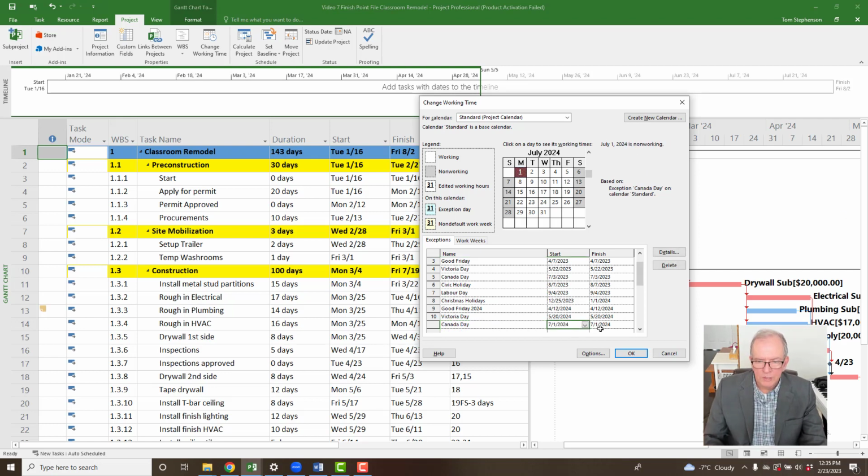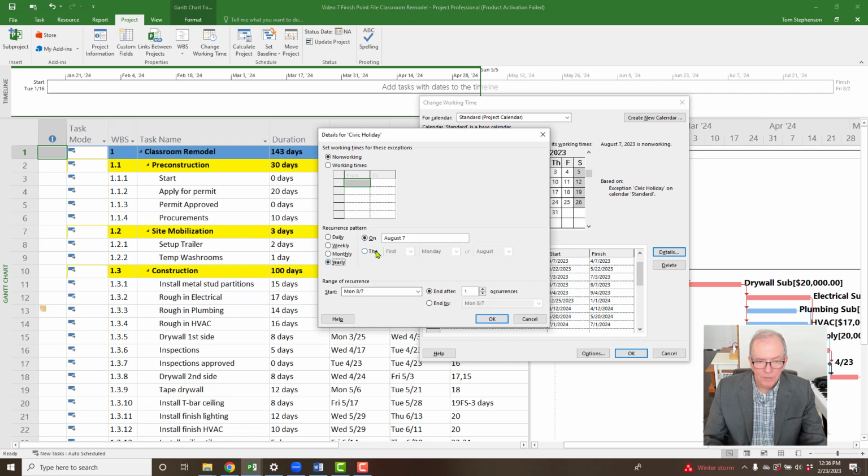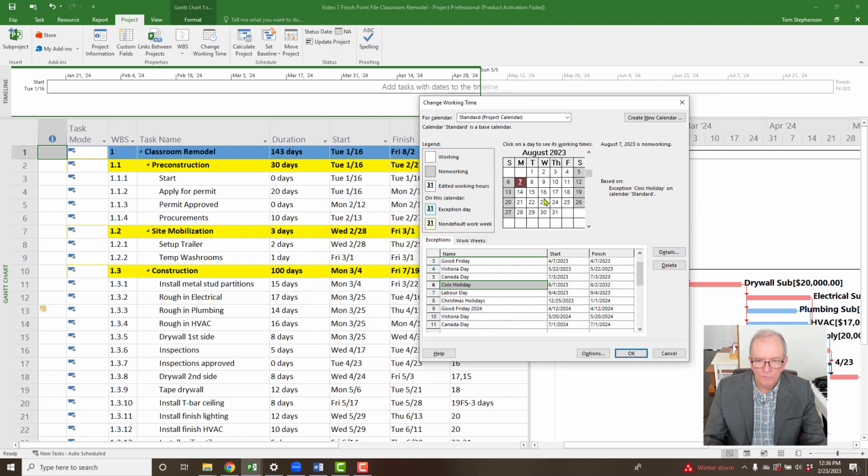Again, as long as you get the gist of how to put in these holidays, we did that in a previous video. I just wanted to update a few things here just so it's a little bit more realistic. And I think we've got one more that I want to put in. So we'll put in the August 5th, the first Monday in August. That's a good one for me to do. That one is the civic holiday, and I can just go to details and I can just say yearly, the first Monday of August, and I can say 10 years, and I've got it for 10 years. So I don't even have to worry about that one.